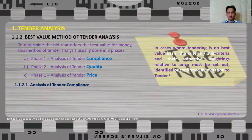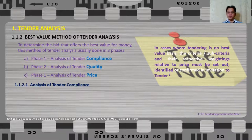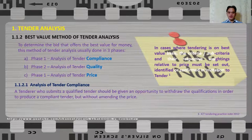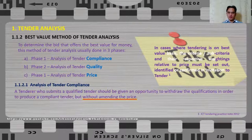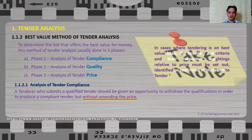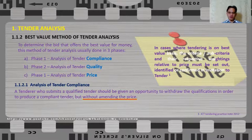What are we looking for when we analyze tender offers for compliance? A tenderer who submits a qualified tender should be given an opportunity to withdraw the qualifications in order to produce a compliant tender, but without amending the price. For example, if a contractor wrote 'not included' against one of the requirements, the tender offer becomes non-compliant because it cannot be compared to other complete offers on a like-for-like basis.